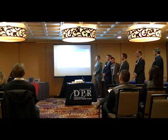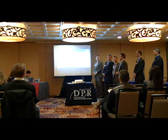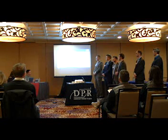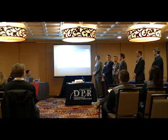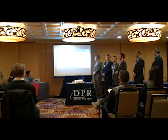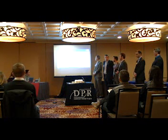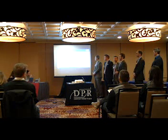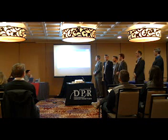Next, since DPR is builders at core, we wanted to self-perform the work of the drywall. We felt that this was critical for the interior works and really pushing the schedule so we can get those finishes done quickly. Next, it saves us money if we don't have to have an additional subcontractor fee due to the fact that we're self-performing the work. Next, since we have the same core values as DPR drywall, we'll have a higher quality assurance with what they do. And finally, again, back to our connections with them, they have the same safety program, which is critical when mitigating that risk.